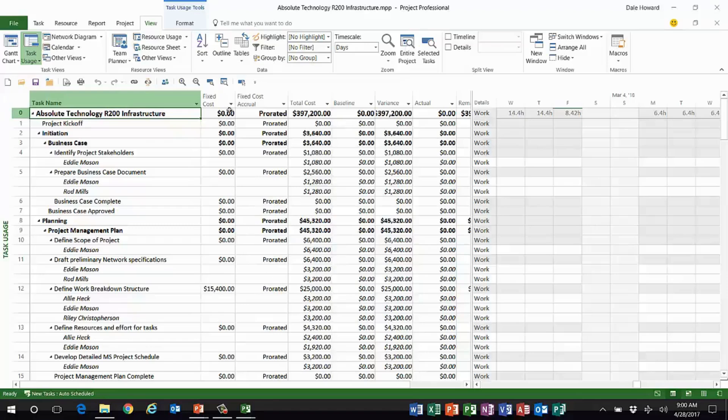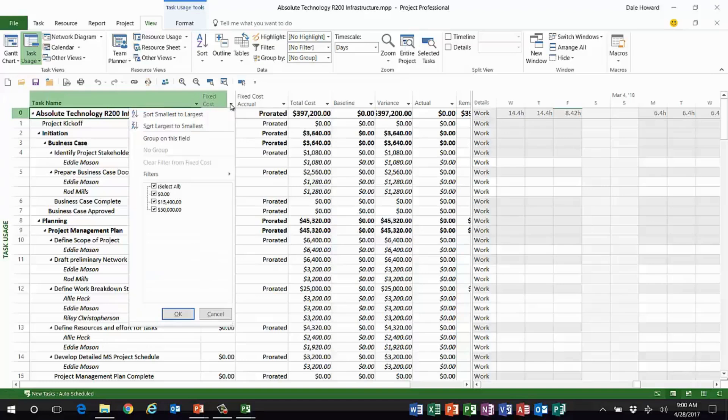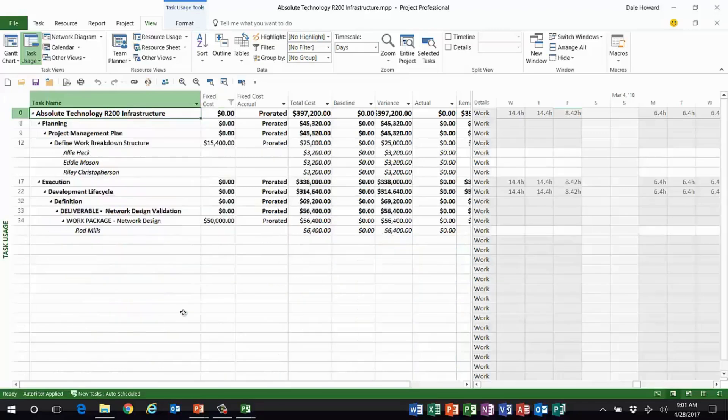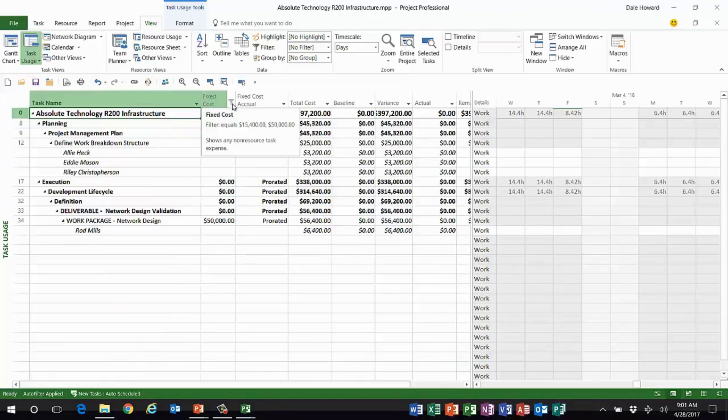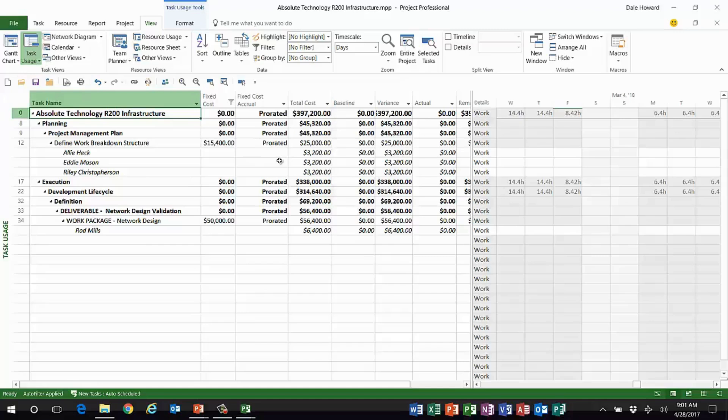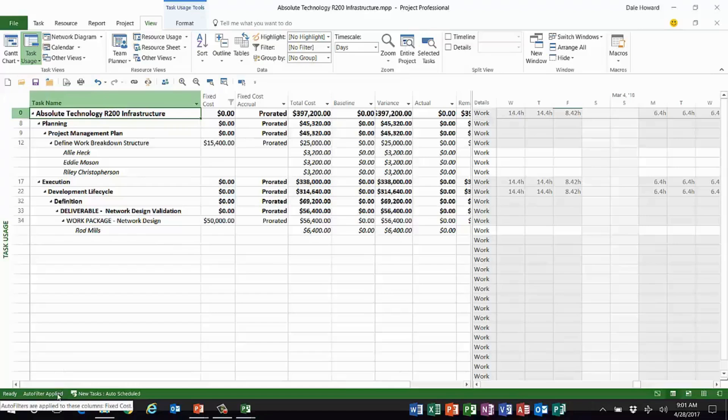There's also some interesting behavior in the status bar that I think you should know about. For example, I want to auto filter on the fixed cost column and select every task that has a fixed cost value greater than zero. So look, I have auto filter applied. I can see it here in the column header, but if I'm in a different table I'd never know.